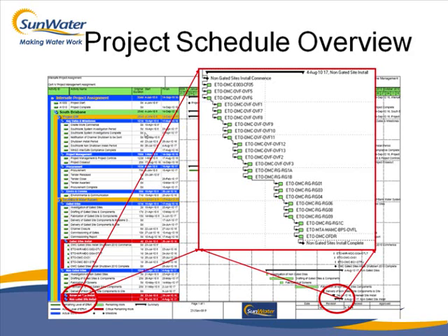This here is not a lag, it's actually the weekend. Government don't work weekends, so we get that off. And then down the bottom we have another milestone. I usually like to put a milestone at the start of a section and finish it up at the end as well, so that you only have to link the other activities to that one milestone, as opposed to all these different activities to different ones.